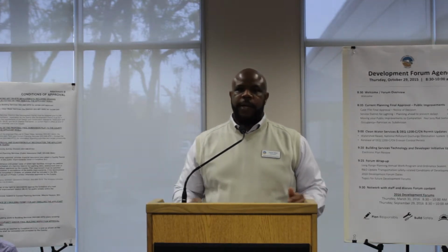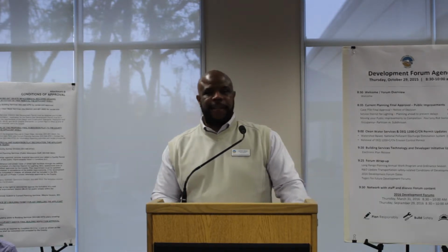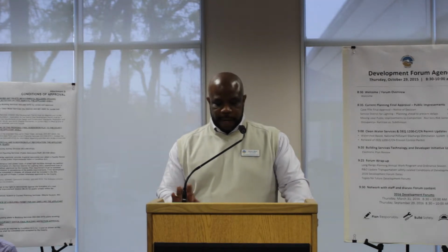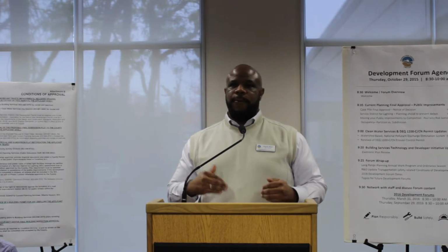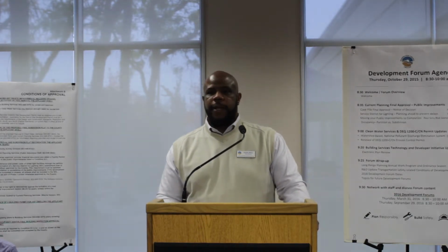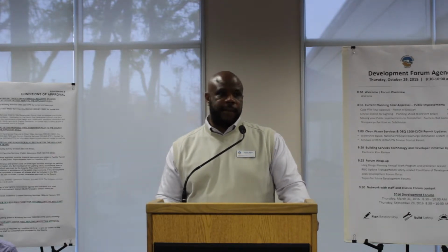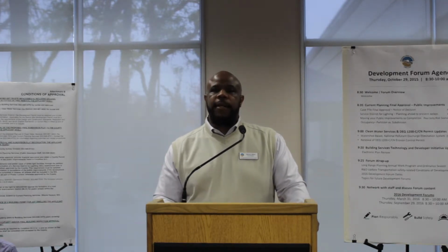The plan is to have electronic plan review where you can electronically submit your documents to us. It's at the infancy stages, but we're testing it right now. What we're planning on doing is to try to do a more rapid review with this electronic approach. It's been proven from other jurisdictions that you can cut down your review times as much as 10 to 15% easily. Other ones have come up to 40% review times that have been cut just by using electronic plan review.